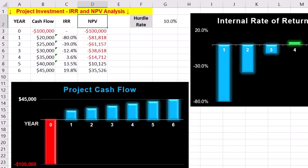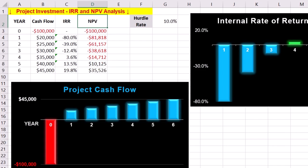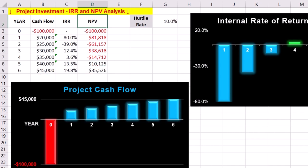NPV starts negative and becomes positive in year 5, showing that the project breaks even in terms of net present value during that year. By year 6, cumulative NPV reaches $35,526, which shows the total value of the investment adjusted for the time value of money.